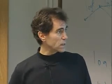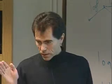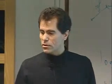So that's always a challenge because, again, you've got different players involved in different pieces, and you've got to make sure it all plays together. And the key there is to create a working group to make sure you address every aspect of integration. You plan very much ahead of time. You choreograph everybody coming in to make sure you've got everything covered.